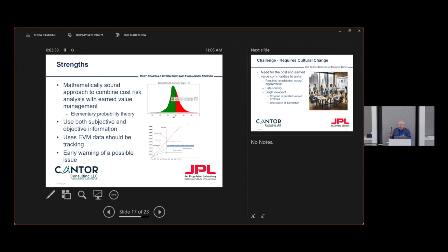And that's, again, taking advantage of all the information we have, adding new information, and that's the real spirit of doing Bayesian analysis. Okay, and the other thing, as I tried to show in the second example, is you get early warning. You sort of know, but you see the implications. If you're spending too much money, you're given very clear feedback that you are, and you're hurting the probability of success, and you have early warning, giving chances to take interventions early and recover, doing management interventions to put yourself back on track to either meet the target or replan.